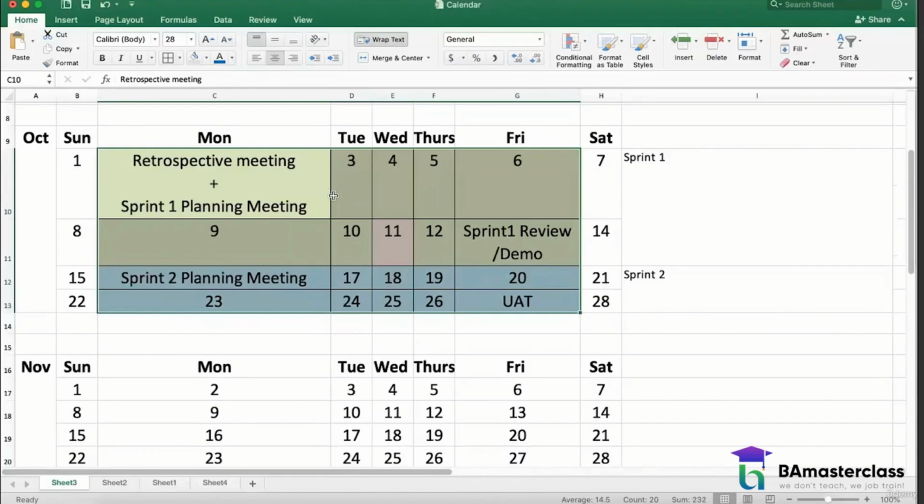So this is like a 15-minute meeting wherein the Scrum Master does a roll call. So the Scrum Master roll calls everyone's name. When your name is asked, you tell the Scrum Master and the team what you did yesterday, what you plan to do today, and you can identify any roadblocks, if any.